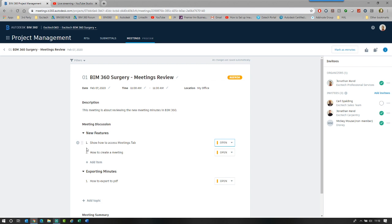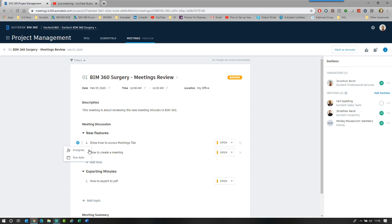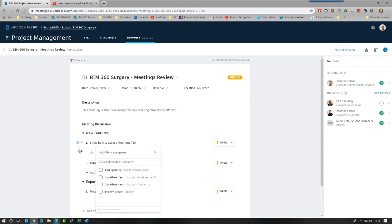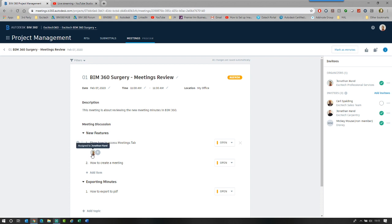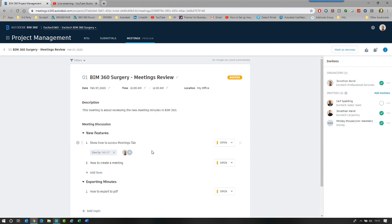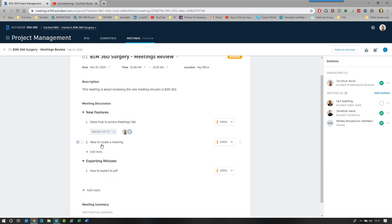Or what we can also do is click the plus sign to the left of the meeting topic. And you can see that we can now start to assign actions and due dates for these tasks within the meeting. So I can say, OK, show how to access the meetings tab. That's going to be assigned to myself. As soon as I click out of the dialog box, you'll see my little face then appears. And it's now assigned. I can also click in and assign a due date of today. So that is on the back of this. This is what I have to do.